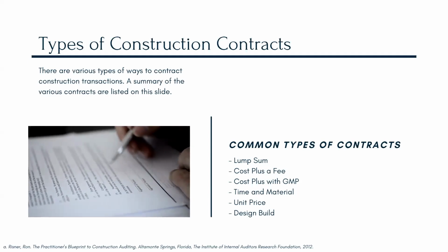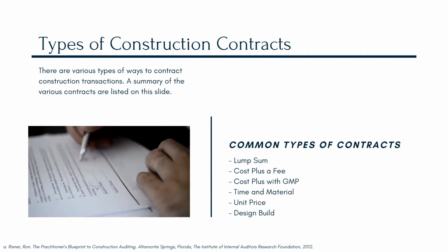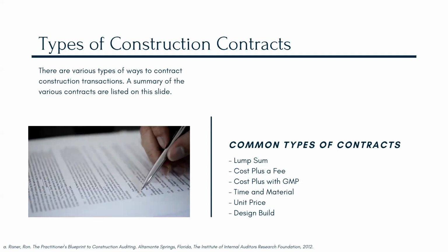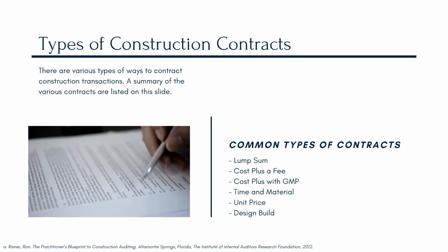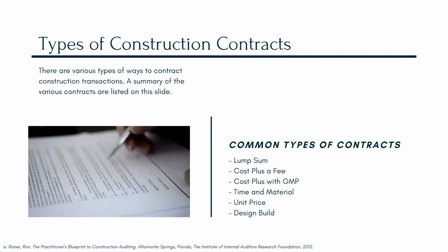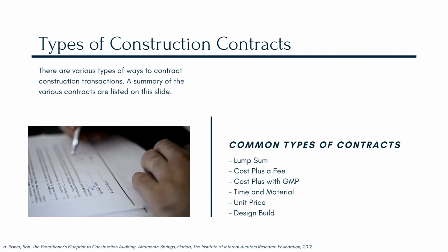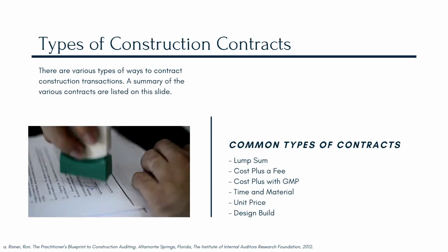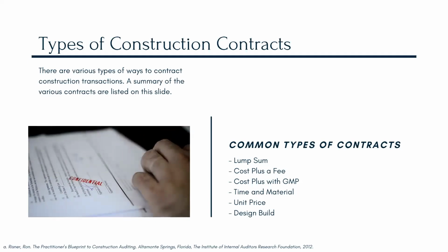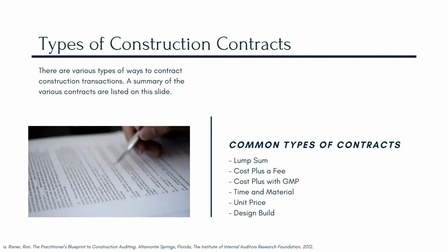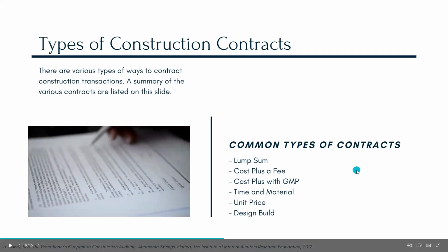Now, because that incentive is inherent to those types of contracts, it creates, from an audit perspective, an inherent risk that general contractors will look to cut costs in order to increase profits. And that's one of the purposes that an audit can help bring to the table for the owner. And the value on lump sum agreements is making sure that the quality of work meets the standards that were negotiated and agreed to on a lump sum agreement.